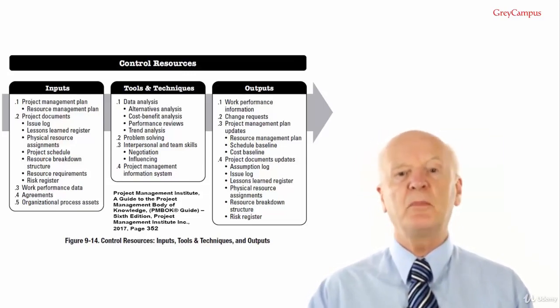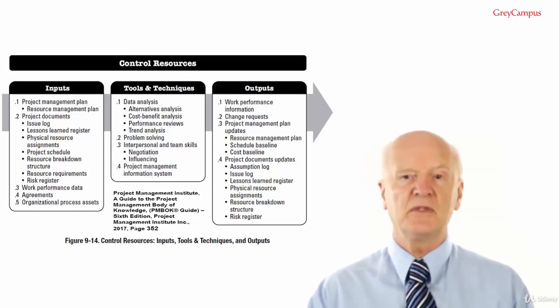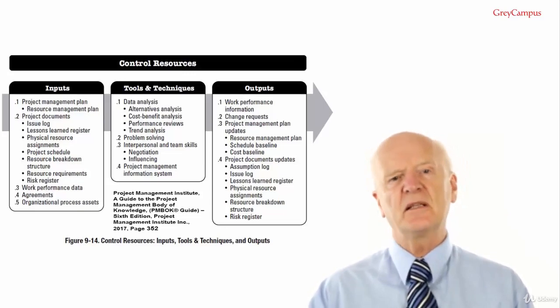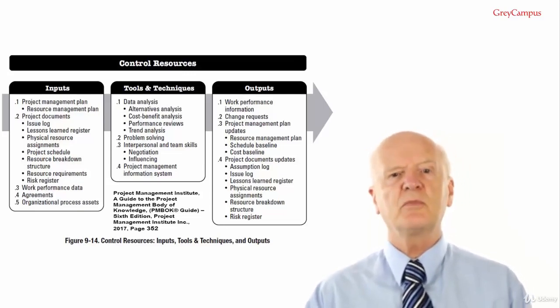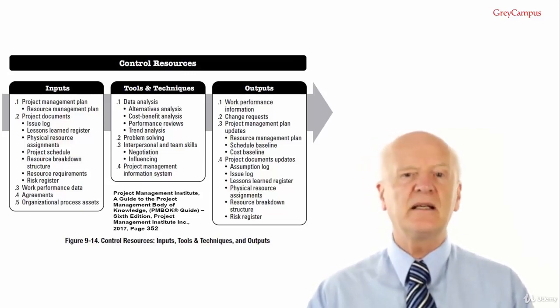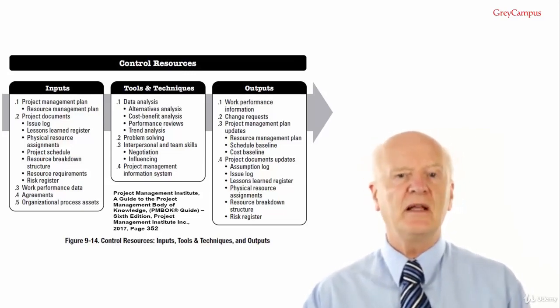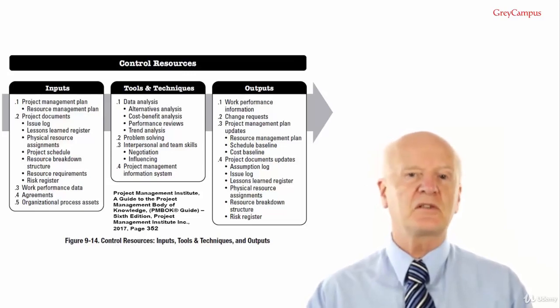Performance reviews. Performance reviews measure, compare and analyse planned resource utilisation to actual resource utilisation. And again, this is a project performance, not team performance. Cost and schedule work performance information can also be analysed to help pinpoint issues that influence resource utilisation.